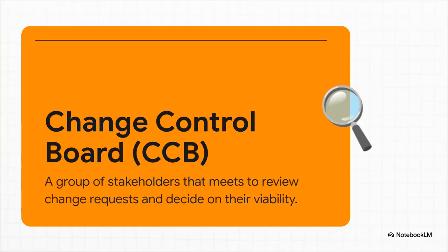To try and manage all this, many projects have what's called a Change Control Board, or CCB. Think of it as a formal committee. You've got your project team, some experts, customers, sponsors, and they're supposed to be the gatekeepers. Their job is to look at every single change request and decide if it's really worth the disruption.